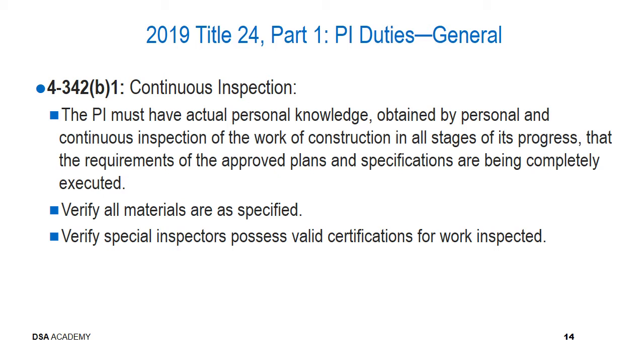And all means all, not just structural, fire, life safety, or access, but all. That includes mechanical, electrical, plumbing, and so on. This also entails verification that all the materials are being provided as specified, and that there is compliance with that, and also verification that special inspectors possess the valid certifications for the work that they are inspecting.